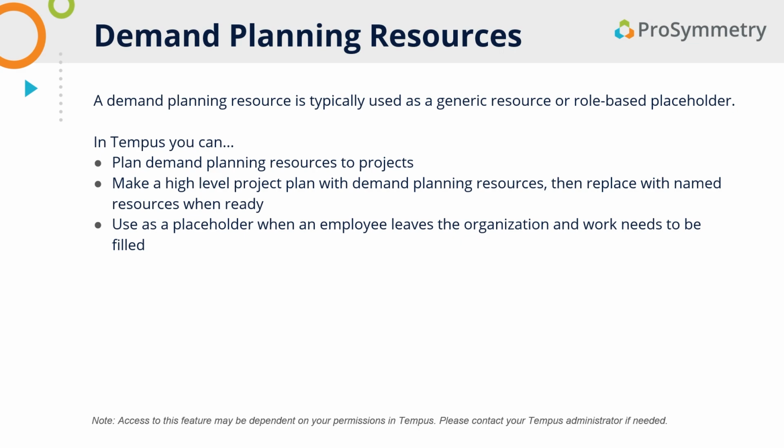You can make a high-level project plan with demand planning resources and then replace them with named resources when you are ready. You can also use these demand planning resources as a placeholder when an employee leaves the organization and work needs to be filled, just maybe you don't know who is going to fill the work just yet.